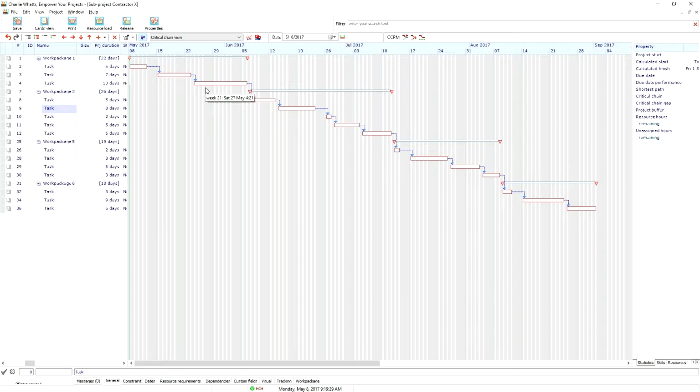To create the integrated plan, I need to enter the critical chain of the subcontractor projects together in a separate project planning. And I do that manually. You might think it would be handy to import those projects directly from Links or directly from MS Project and link everything together. My clients do ask for that, but the plans of subcontractors are normally full of errors, faults, unclarities, obsolete information you don't need. They're too big, too complicated to grasp, and distract from what is really important, the critical chain.